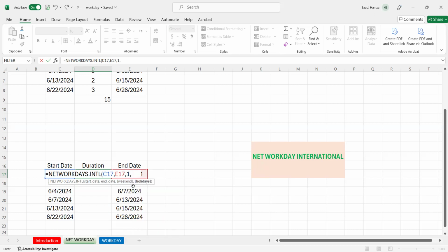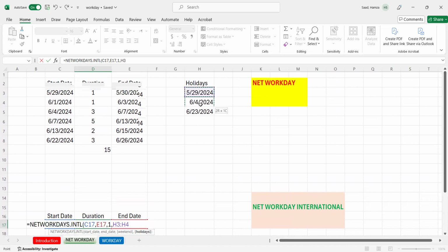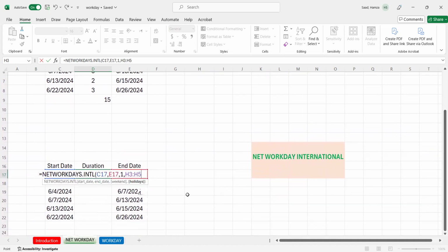After that, if I have holidays, if I put 0, then it's going to be considered as no holidays. But even if I put 9 days or something, it will not be considered in the calculation for my start and finish date, because I need to put the exact date in order to be excluded from my project. What I'm going to do for this one is include the holidays that match my time frame for my project. Now for this one, I'm going to include the dollar sign.